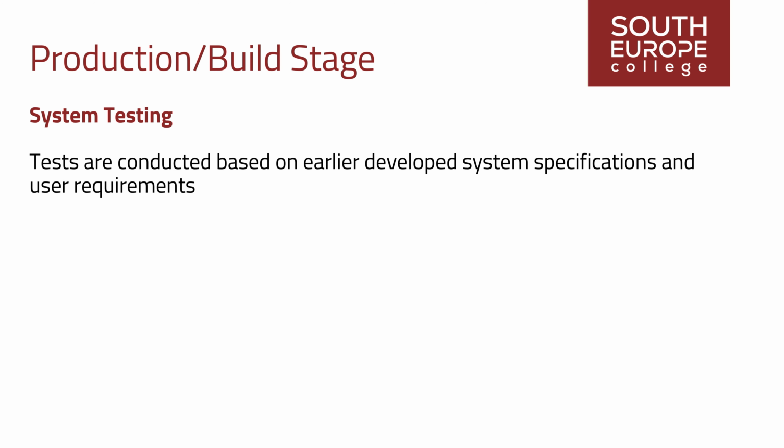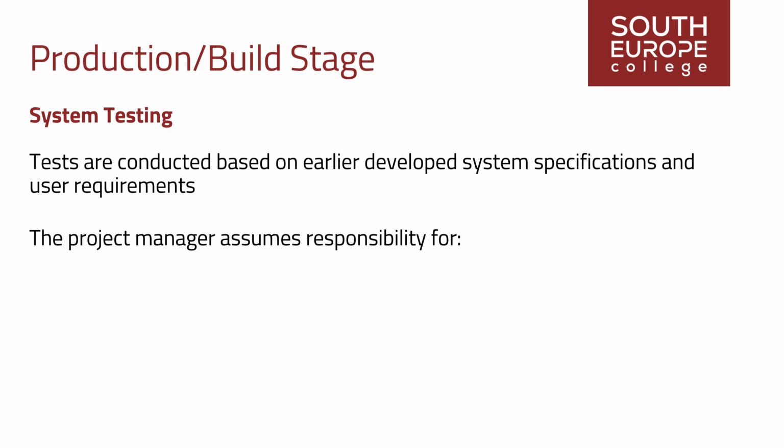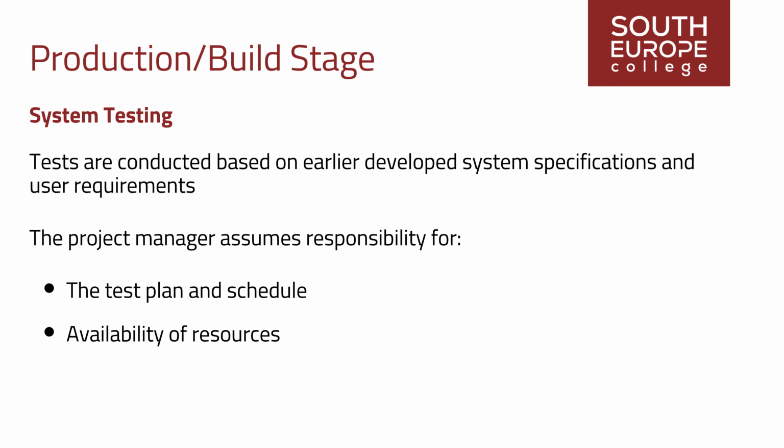The project manager assumes responsibility for the test plan and schedule, integrating them into the production build plan. Ensuring the availability of necessary resources for the tests, documenting test results comprehensively, and filing them for future reference are all overseen by the project manager.